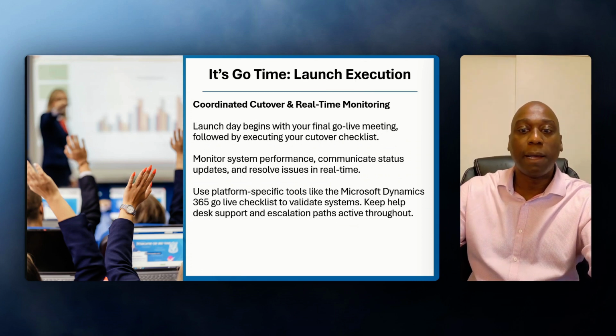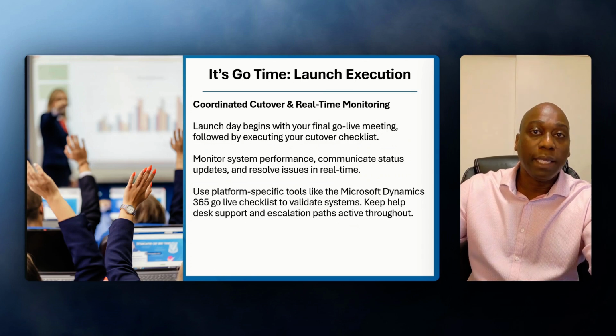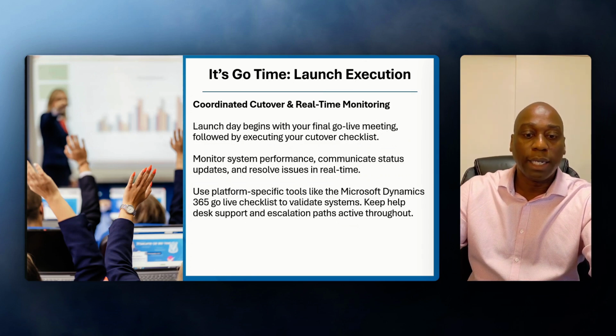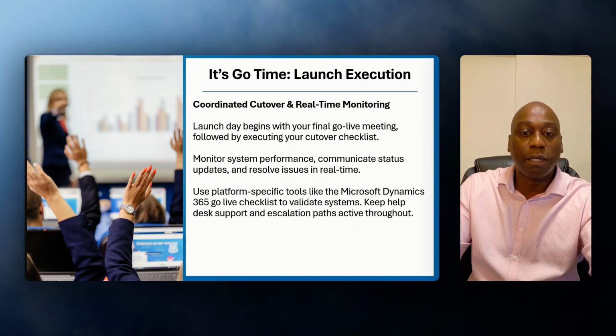Let's say, for example, go live is happening over a weekend. You should have a war room set up to go on Friday, and everyone is showing up on Saturday. A lot of times, big go lives happen over the weekend, and normally people don't work over the weekend, but during go live, we ask everybody to be available.